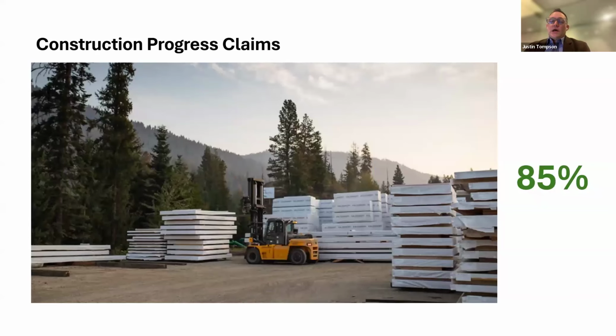Next. And then during construction, it was trying to understand the cash flow. This was a unique one. The picture here is of Kalashnikov's works yard in Castleguard. They produced all of the mass timber. They were the subtrade under Ventana for all the wood. So what you see here might typically be one lot for a conventional building or a building like Keith Drive, but their portion of the contract was mostly done on their site before even a stick of wood actually landed on site. They had progressed under the schedule of values close to 85% of their portion of their subcontract.